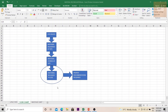The major problem comes when the material is released to site. Most projects don't keep proper documentation while releasing materials to site. If proper documentation is maintained at this stage, a quantity surveyor can use it to do a proper material reconciliation — maybe every month — just like how a quantity surveyor prepares an interim payment application every month. This can be used by the project-in-charge to understand if wastage is in excess or which materials are getting wasted excessively.